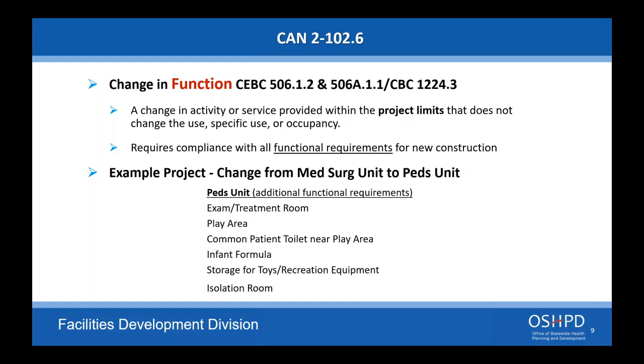They may ask to see them. That's why I was mentioning earlier to contact the CO, your compliance officer. They do want to make sure that the materials being put in are applicable to a hospital or a nursing home or whatever it might be going into. Yes, they may ask about flame spread. Even in re-roofing projects, they're going to want to look at the product going in there, at least look at the spec sheets. Again, talk to them, ask them what they want to see for this.